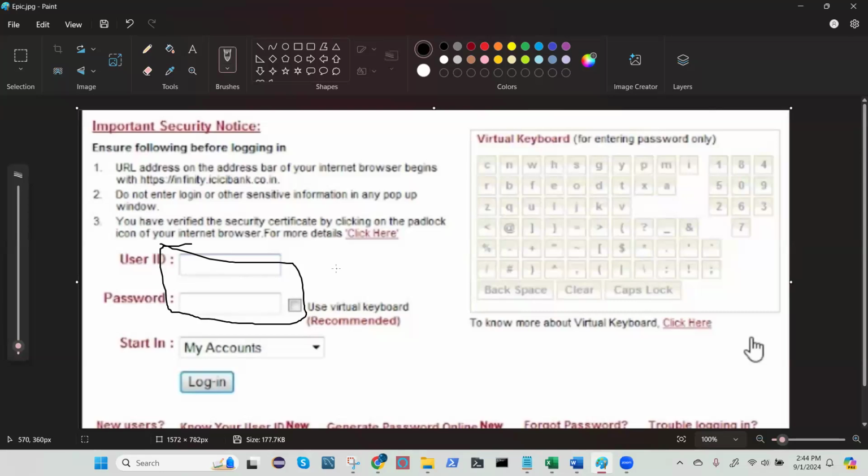Let's say first I'll put edit boxes on the screen, first step, and you can treat that as a user story. Now the purpose of this user story is to articulate a piece of work, and a collection of pieces of work is a big epic. So to implement that login page, I have to do at least 15 pieces. So this is 1, this is 2, this is 3, maybe 4, the keyboard visuals, and all these footer links like new users, know your user ID, create, generate password. All this is like a footer link.